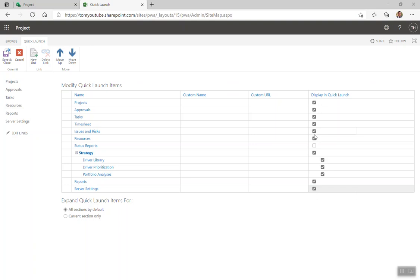Issues and risks. This allows the end users to see any issues or risks in the projects that have been assigned to them. That would be done in the project site. You can see we did that in the project site templates earlier. At this point in our video series, we have a project site with issues and risks that we can assign to people. So you might want to allow them to go to one central place to see all their issues and risks.